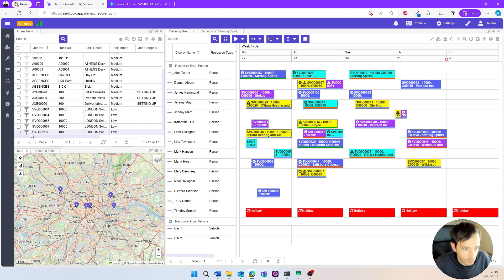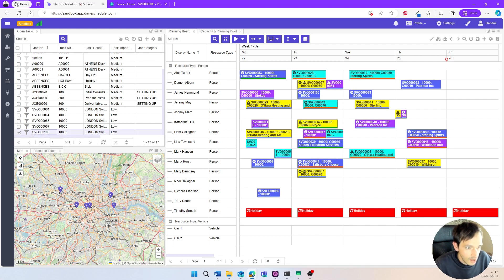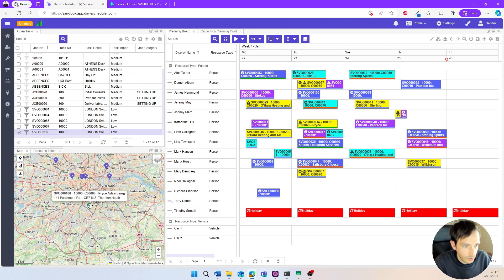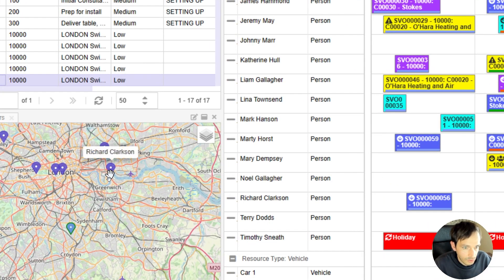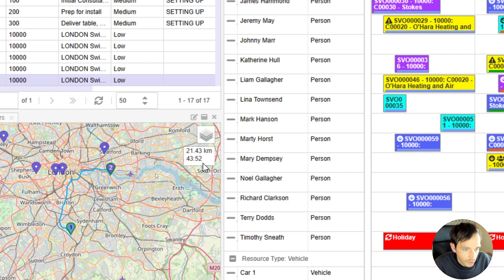Oftentimes you may want more guidance from a tool like Dime Scheduler to locate the right resource. You can use the address information — if there's a pin location available, a marker is placed on the map showing where the order needs to take place. Purple color pins show nearby resources that could execute the job. For example, we can calculate a trip for Richard Clarkson to see how far it would take him to get to the site — it will take about 45 minutes based on traffic and route, which helps decide whether to assign him or not.